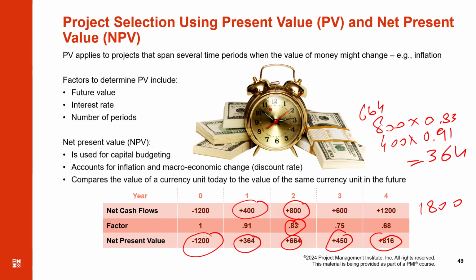And you can find the discount factor chart in any book of maths or statistics or finance, accounting or anything. This chart is normally available. But anyways, I'm just showing you the figures for the 10%. That is first year, the discount factor is 0.91, second year 0.83, and so on. So, can you calculate and tell me what is going to be the total net present value?